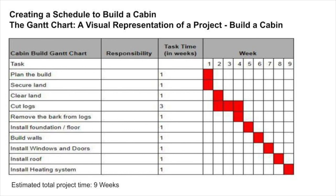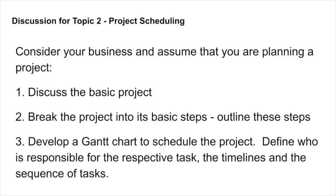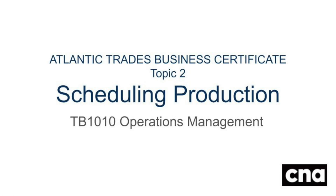That's really the big takeaway I want you to bring away from this — to be able to understand the Gantt chart and to be able to use it. In the second discussion forum, think of a project and develop a Gantt chart for it. It's really no different than what I've done here in this little example: think of a project you want to achieve, break it down into its various components, estimate the time frame for each component, determine whether components need to be in sequence or can be done simultaneously, and develop a Gantt chart for it, which gives you the total timeline for that project. I'm sure that if you get a handle on building a Gantt chart, you will find this a useful tool in your business for moving production processes through fairly efficiently. Thank you very much.